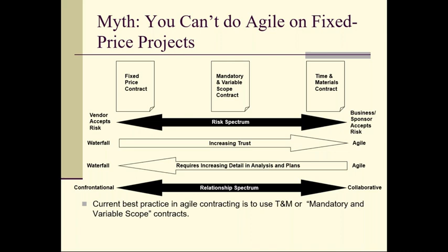But this is an Agile project. There's going to be some stuff that's uncertain. Probably not the mandatory stuff. The uncertainty will come with the should-haves and nice-to-haves. So after we complete phase one, then we look at phase two. Phase two, we divide it up into iterations, into sprints, waves, phases. In Agile, they call them iterations. And maybe we have 6 one-month iterations, right? So we have 6 one-month cycles of time in which we're going to get some of this variable scope done.